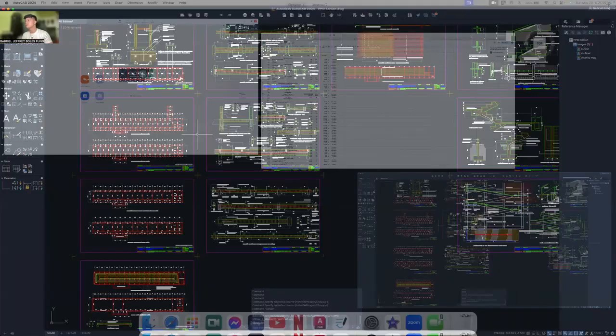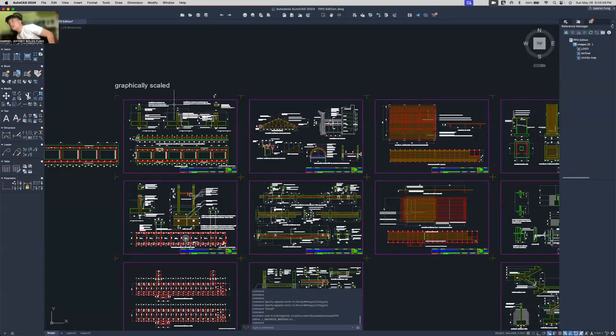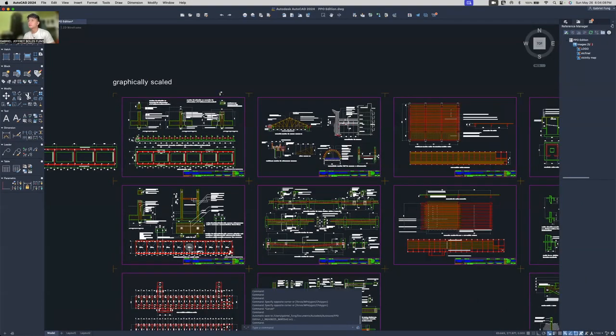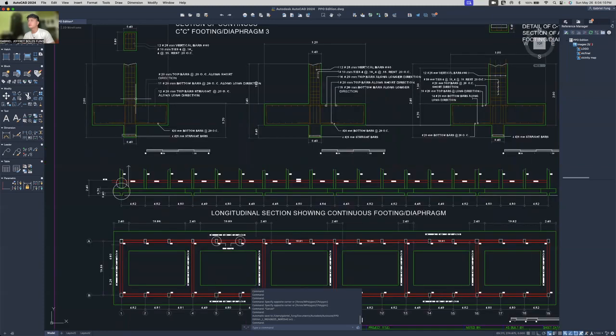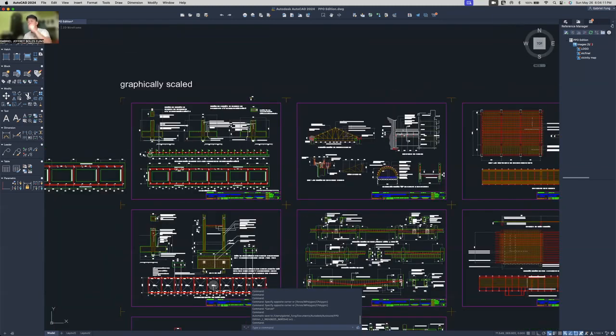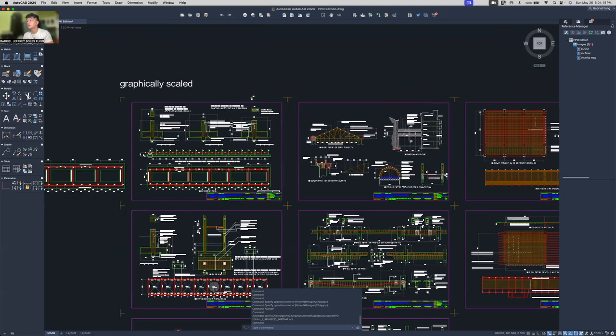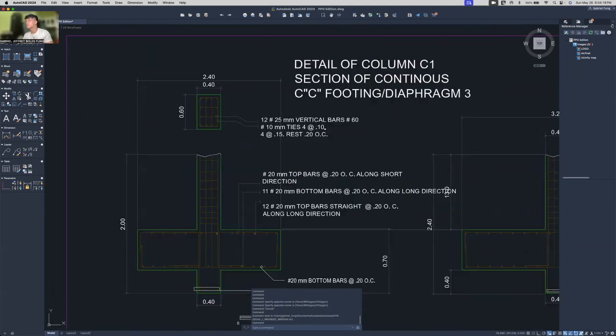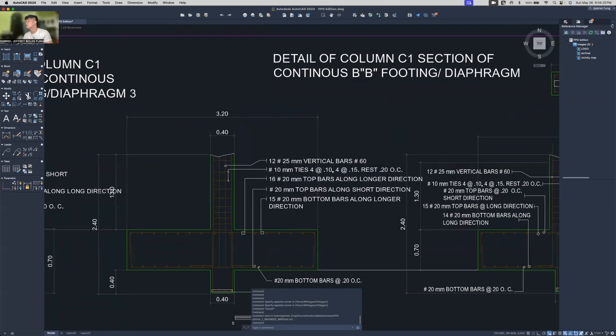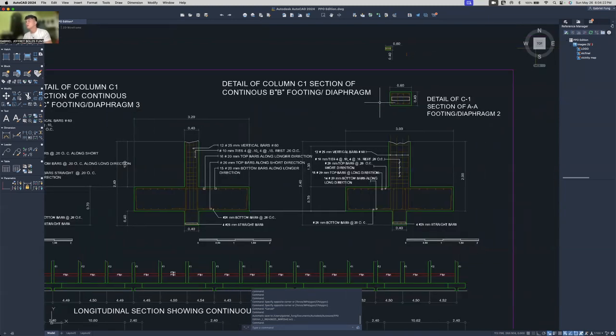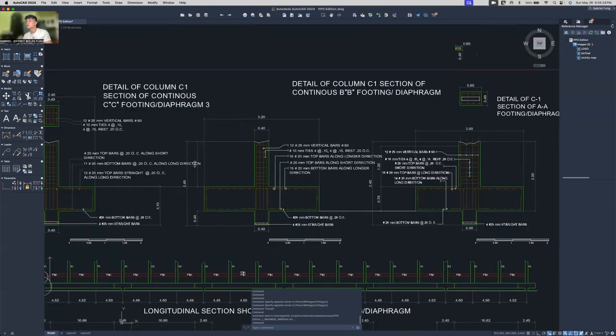After that, we utilized the total length of the columns. The total height of the building from the foundation was identified, after which we multiplied the total height by the number of rebars needed for each column, which is, I think, only the same values.